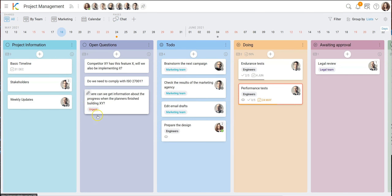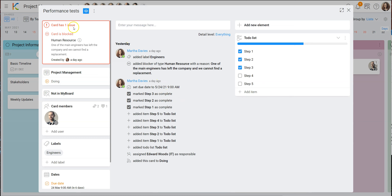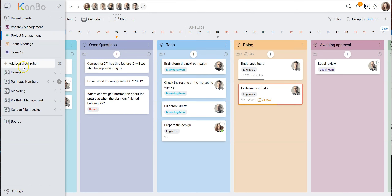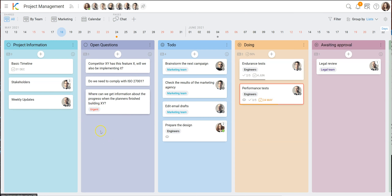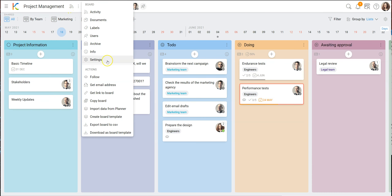The last thing I'd like to tell you about in this board is the concept of blocks. You see this card is marked red. When I open it, you'll see it has one issue — the card is blocked. The block type is 'human resource' and the reason is: one of the main engineers has left the company and we cannot find a replacement. This block is also visible at the board collection level — you see 'one block', and clicking it shows which card is blocked.